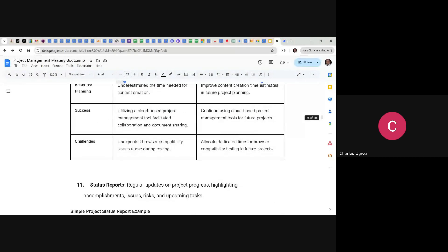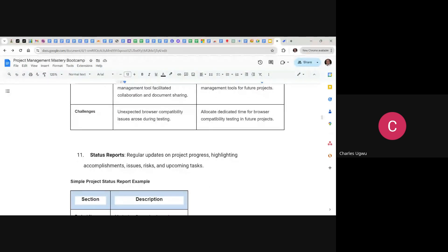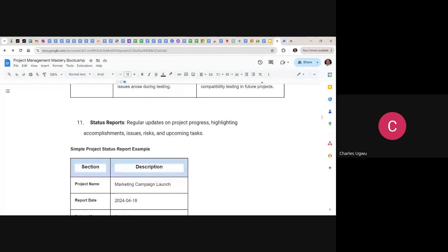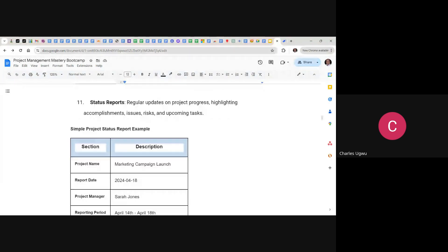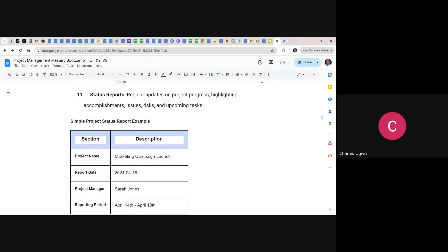Then we have status reports — a regular update on project progress highlighting accomplishments, issues, risks, and upcoming tasks. When you are working as a project manager, you don't need to constantly bug the project sponsor or stakeholders. You produce a report on a weekly basis where you present to stakeholders and discuss progress, accomplishments, issues, risks, and what you plan to do the upcoming week. You do it in a document, present it, and continue on a weekly basis.